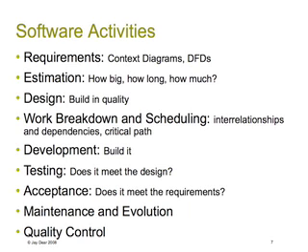Always good in an organisation to keep a track of what your estimates for a project were and what it turned out to be in the end, so you can see how close your estimates are. You can approach people who know these things well. It's a Delphi method. You can sample a number of experts to say how long is this going to take. A number of ways of estimating.